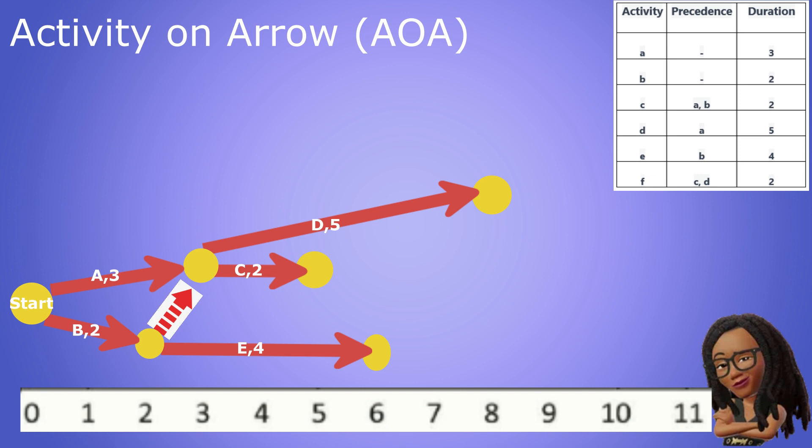Activity F has both C and D as predecessors. While activity C ends on day five, activity D does not end until day eight which means F has to wait until then to start. We draw the activity F arrow from the terminating node of activity D for a length of two days which means it terminates at day 10. And like we did for B and C, we represent C and F's relationship with a dashed arrow.